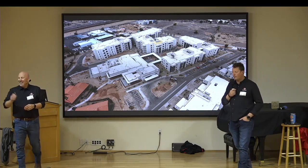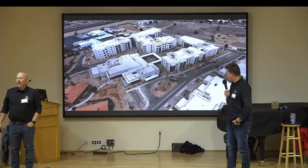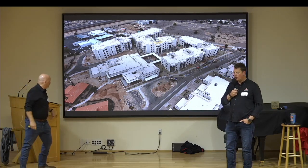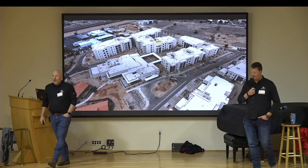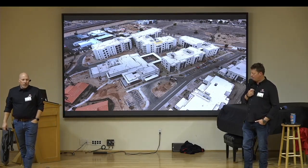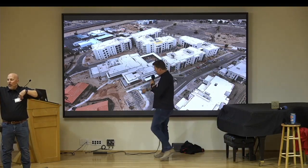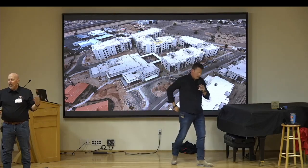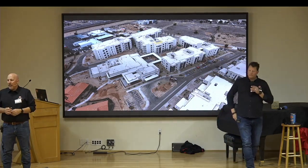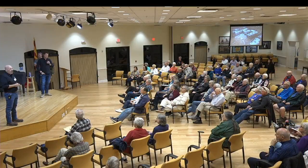Yes, sir. There's a railing now on the retention basin just to the north of that. Will there be a handrail around that? Yeah, the question was, will there be a railing, because we've had to make it wider and steeper. Anywhere a railing is necessary, we've already been talking with Royal Oaks about this. This may result in some railings having to be added because we've had to go steeper than what we originally thought to get the volume. So good question.